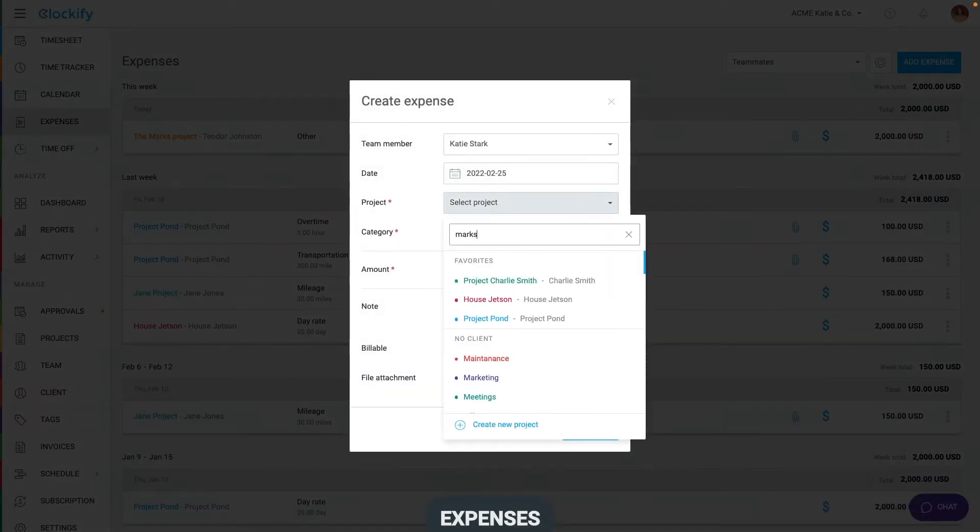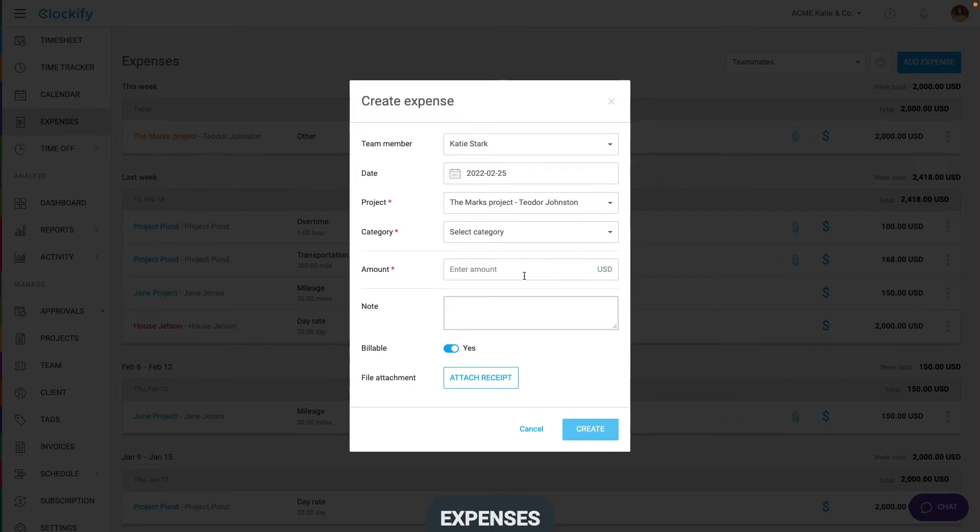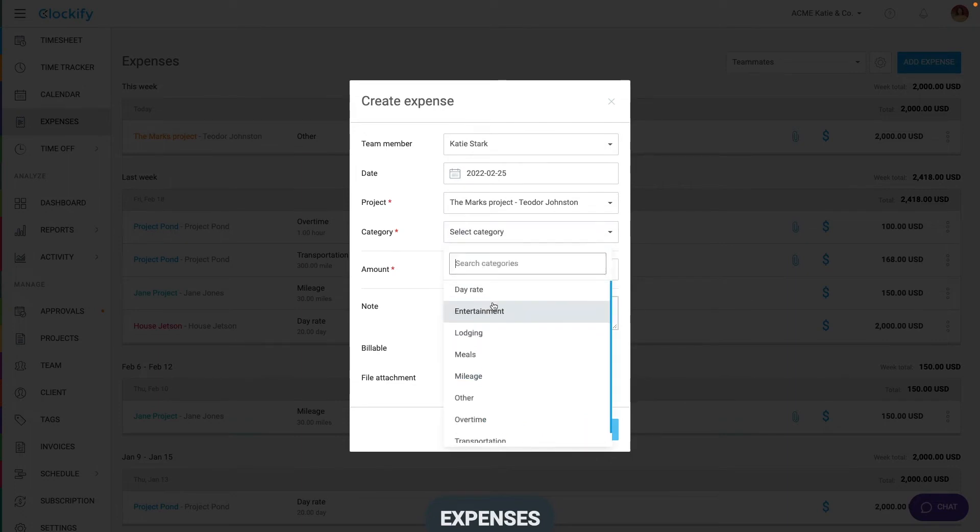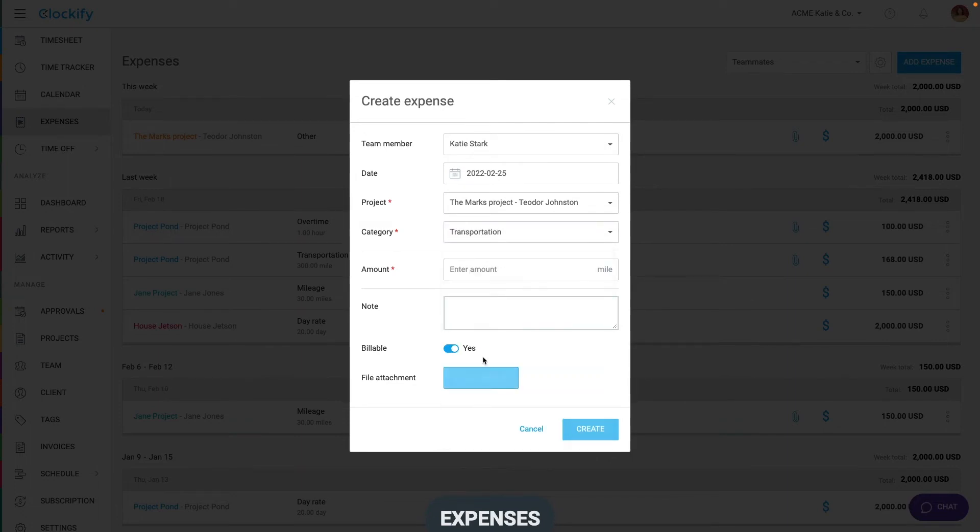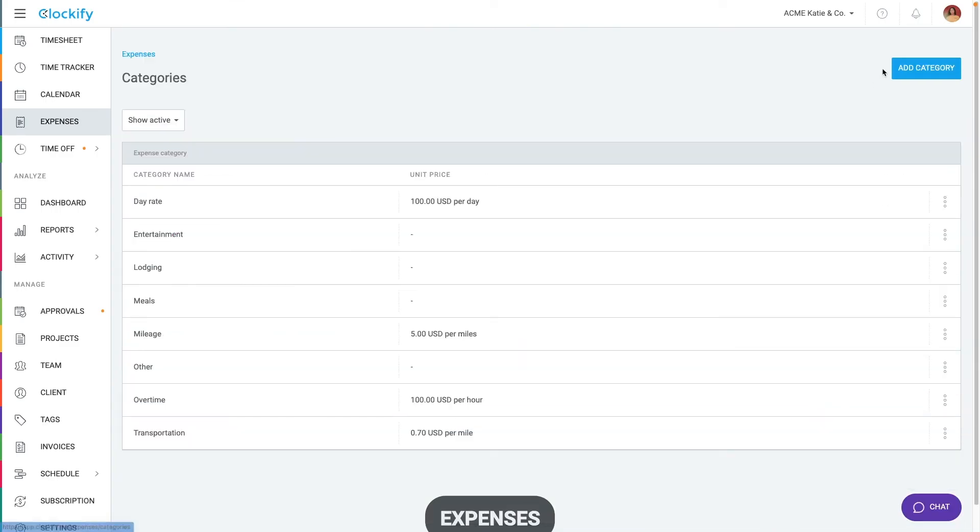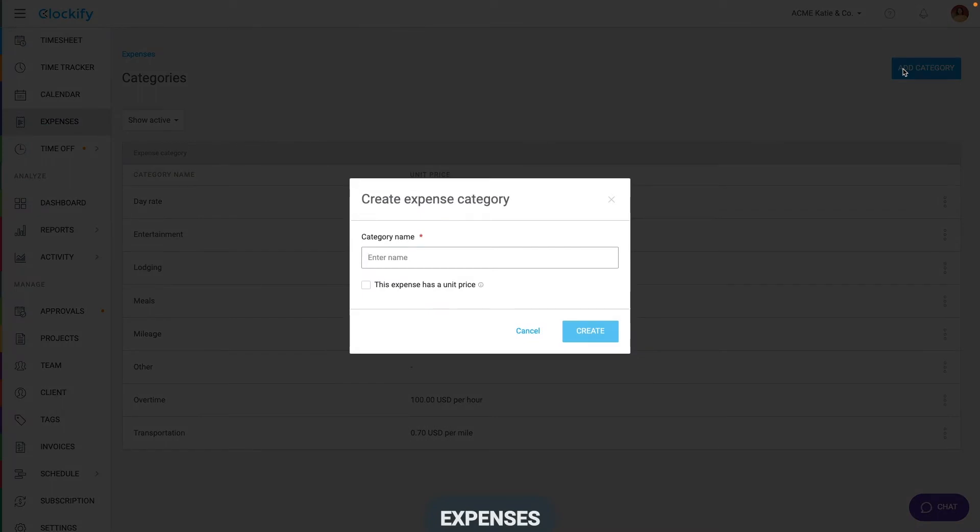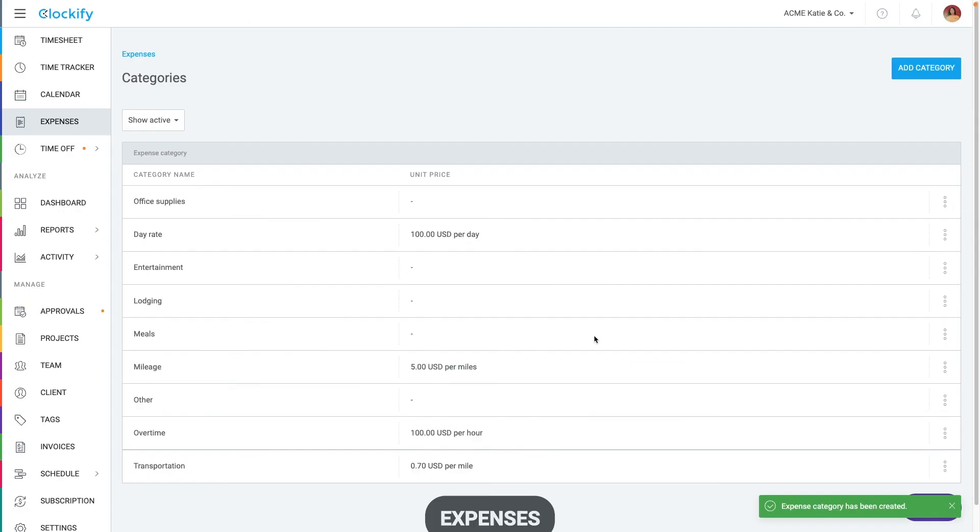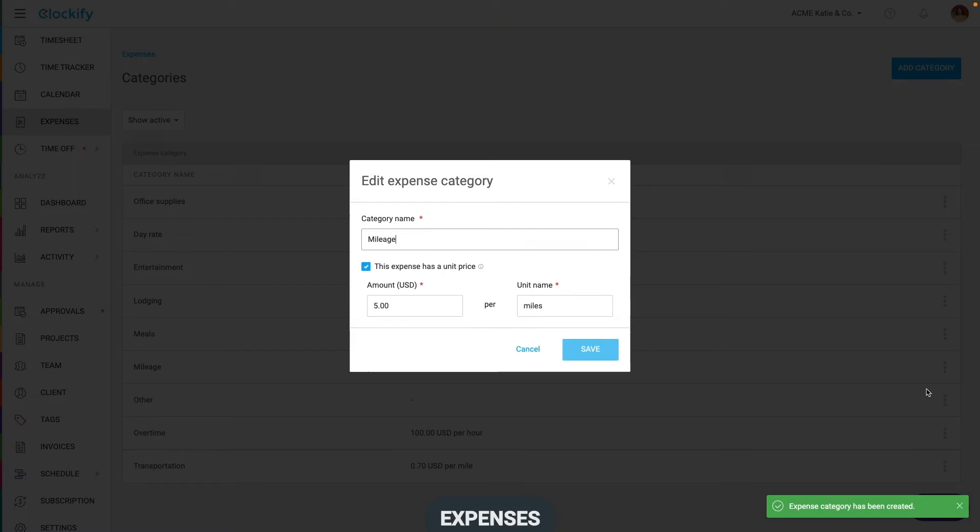If you choose a category that has a unit price like mileage, you'll need to enter unit quantity like number of miles and that will be multiplied by unit price to get the final amount. You can define additional categories in expense settings plus change existing ones in case you wish to change their name or unit price.